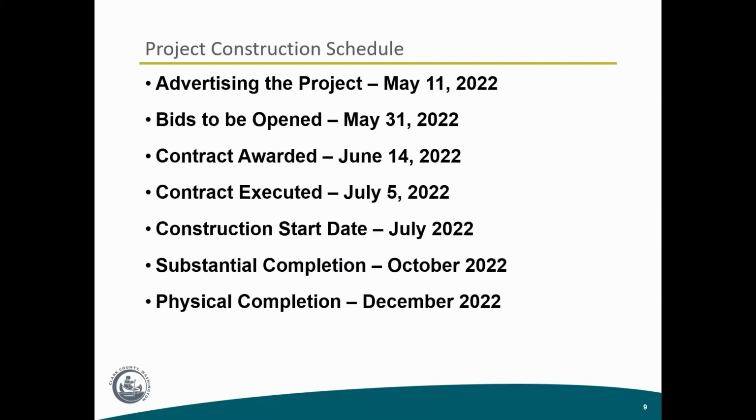Once the contract is executed and all parties have signed, it will be right around July 5th, 2022. Construction will start shortly thereafter in July of 2022, this summer. Substantial completion of the project will be in October of 2022, and then physically complete by December 2022.